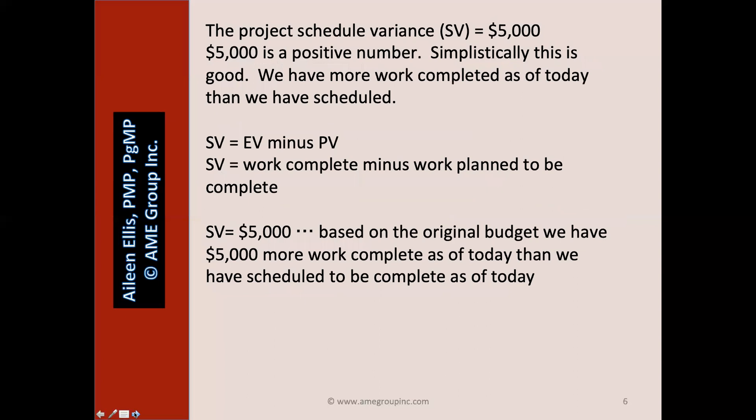The project schedule variance equals $5,000 — a positive number. Simplistically, this is good; we have more work completed as of today than we have scheduled. Schedule variance equals EV minus PV, meaning work complete minus work planned to be complete as of today. If the schedule variance is a positive $5,000, based on the original budget, we have $5,000 more work complete as of today than what we have scheduled to be complete as of today.